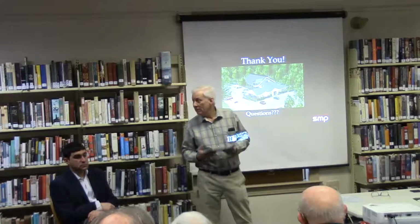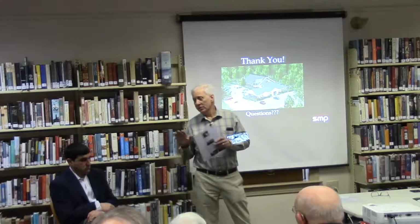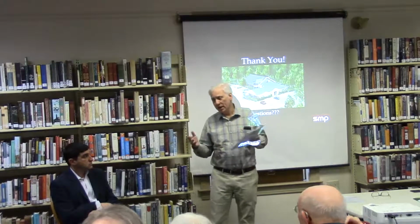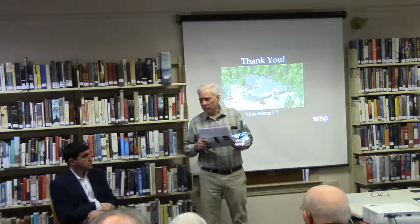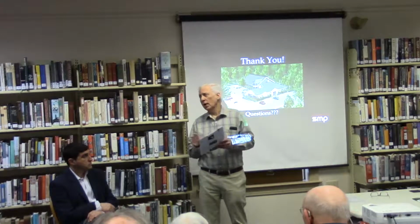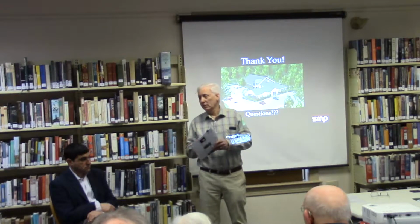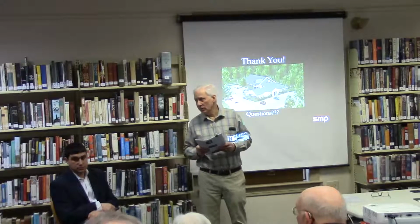Whose decision is it which option to use? It's up to the selectmen to decide not only what bank to go with but also the terms of the loan. But they won't make that decision until it's actually approved at town meeting. Once it's approved, then they can go back. My recommendation would be for the selectmen, probably within the next 3 weeks, to lock in a rate. The 2.3 was quoted last month. I wouldn't expect it to change a whole lot, but they couldn't give me a lock rate until it's actually approved at town meeting. But they can lock it in a week or two before town meeting, and then if it's approved, that's the rate that's locked in going forward.